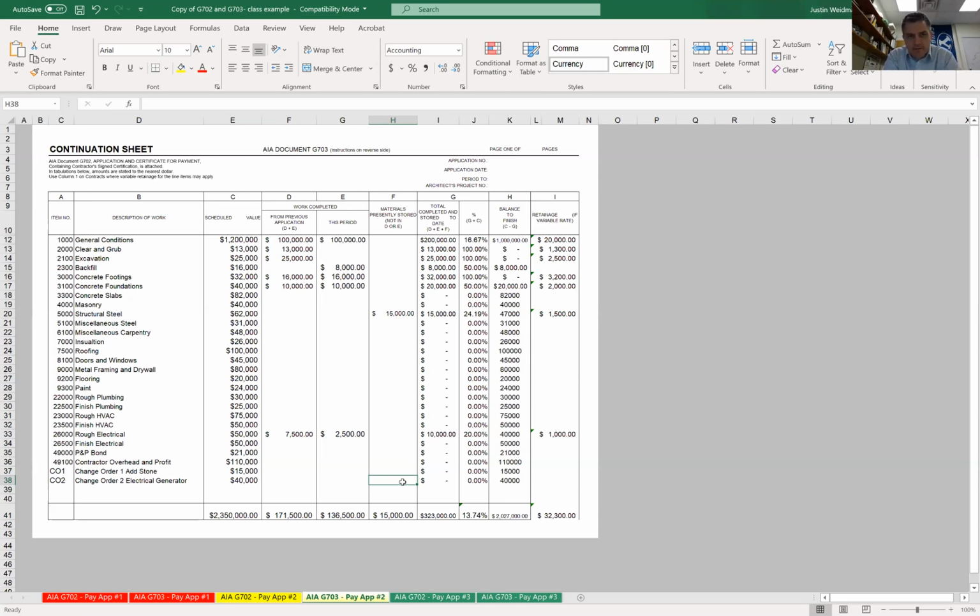Now, once you've submitted your pay application, it's beneficial to reach out to the owner a few days before it's due, just to make sure that everything's on track and that they don't have any questions. It also reminds them that it's due soon. And if a payment isn't received when it's expected, call to see what the problem is. Make sure you're setting those expectations up front that you expect to be paid on the days that you've agreed upon. The longer a late payment exists, the harder it is to collect on that payment. And so if they don't think they're accountable, they'll let payments slip.